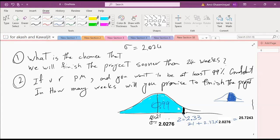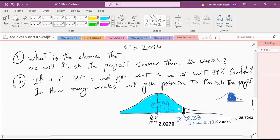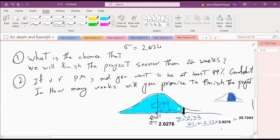A student asks if there is a formula for that last calculation. Yes — from your statistics class: if you are at Z equal to 2.33, you are 2.33 standard deviations above the mean. So the point is mean plus Z times standard deviation.